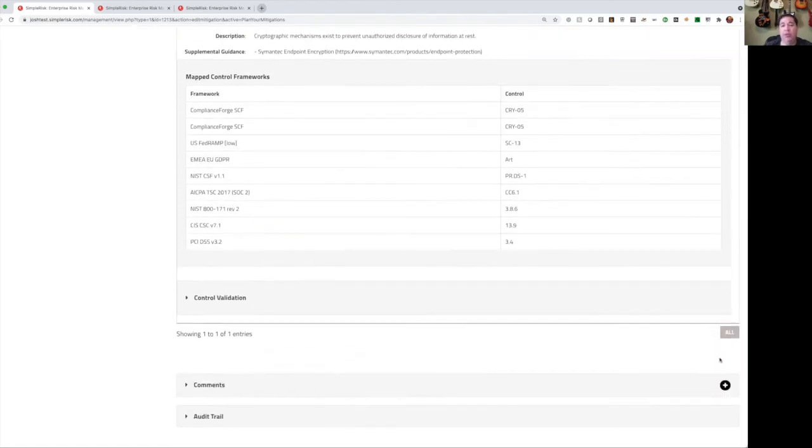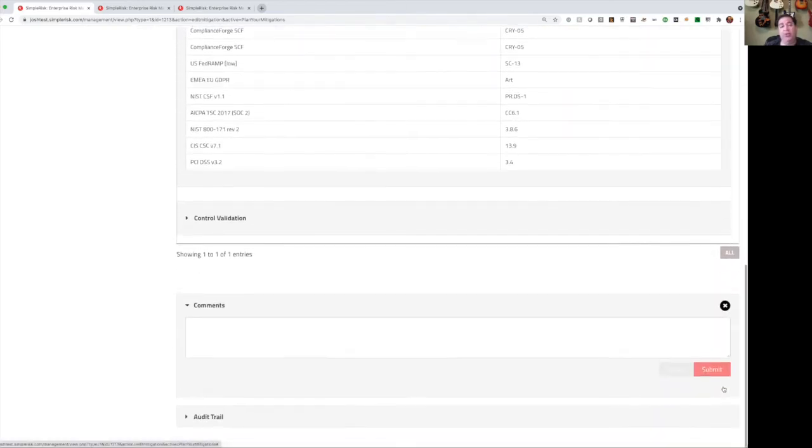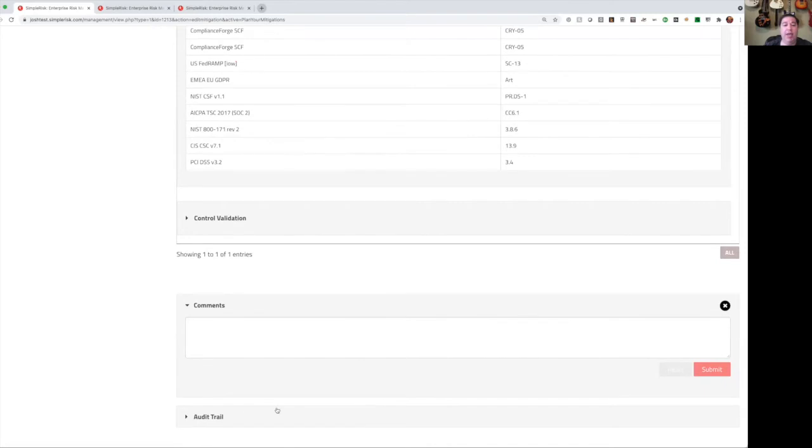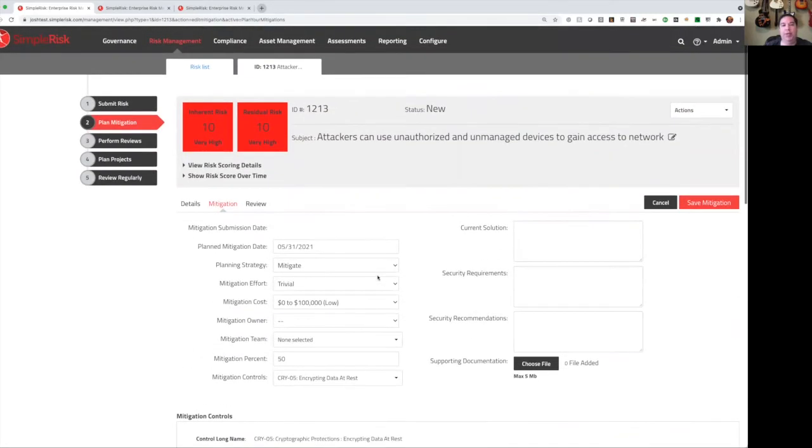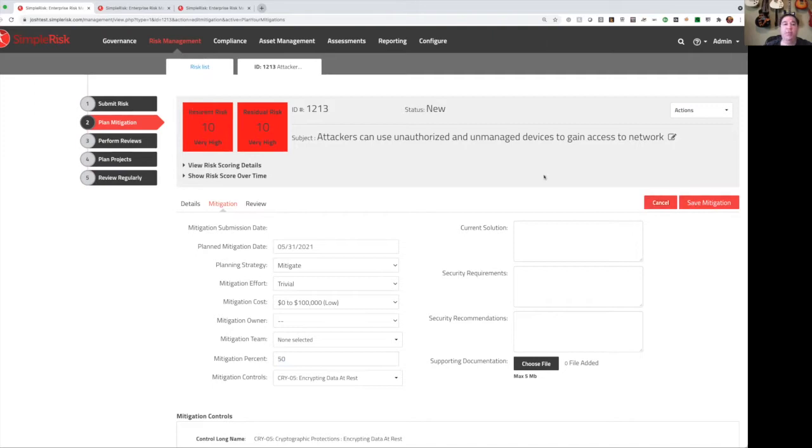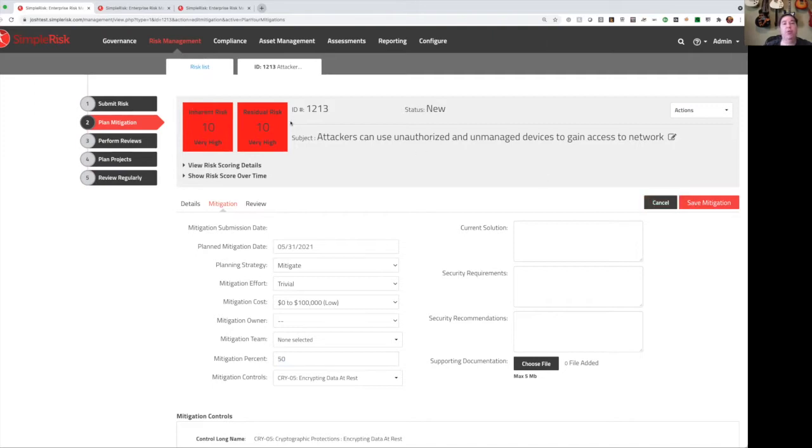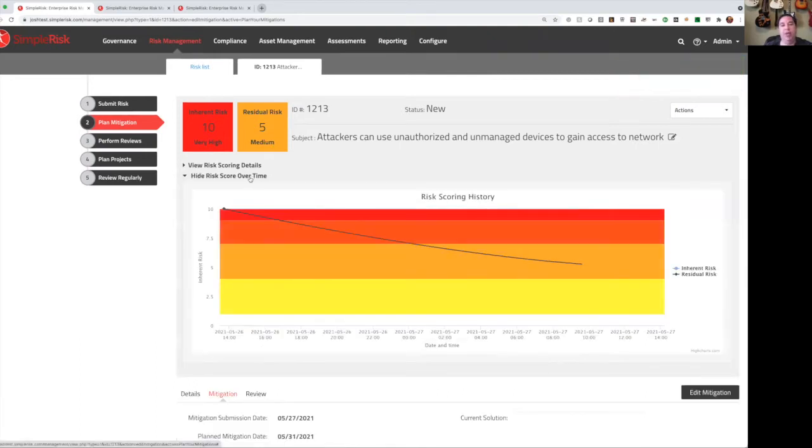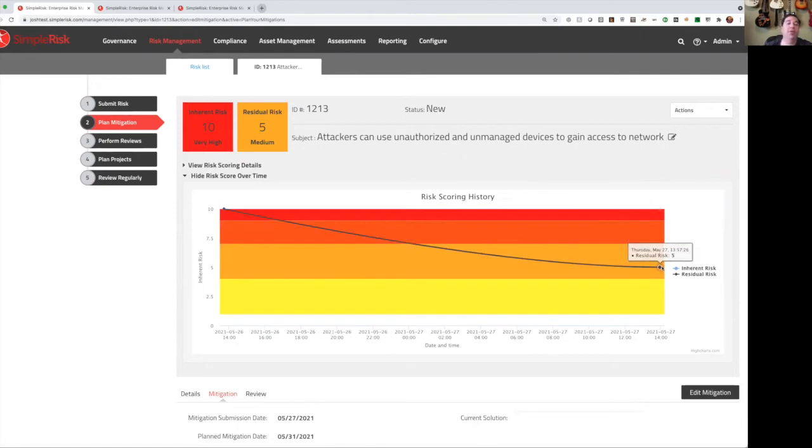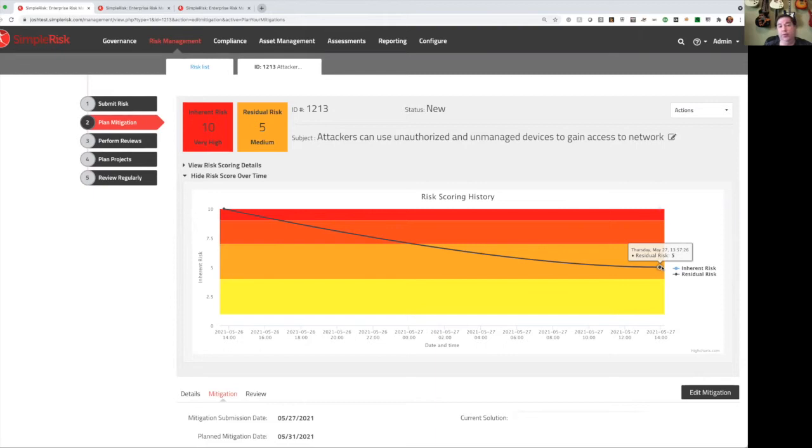And at the bottom, you can add comments to this risk, have conversations about it, and each risk will keep its own audit trail of everything that's happened. Now, as I mentioned, I am applying a 50% mitigation to my risk. My inherent risk score is 10, so when I hit save mitigation, my residual risk updates and it's now a 5 or a medium level risk. And we can actually see how these risks are changing over the course of time in this chart right here. We can see that my inherent risk score was a 10 and is still a 10, but my residual risk has now dropped to a 5. And as you go, and as you update your inherent risk score or your residual risk score, this risk scoring history chart will change to reflect that.